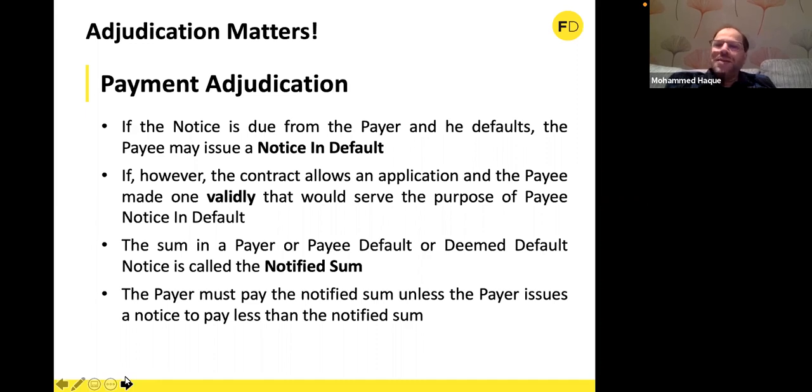Rather, payers normally say in situations like this that if you fail to send it, we will not even consider it until the next month. So, caveat payee, there isn't anything like a payee default notice. There's a payer's default notice, meaning that if the payer defaults, then the payee may come forward and say, you have defaulted. You are under the obligation to do the evaluation. You have defaulted. Now you have no chance, but I will now specify. The Act allows that.